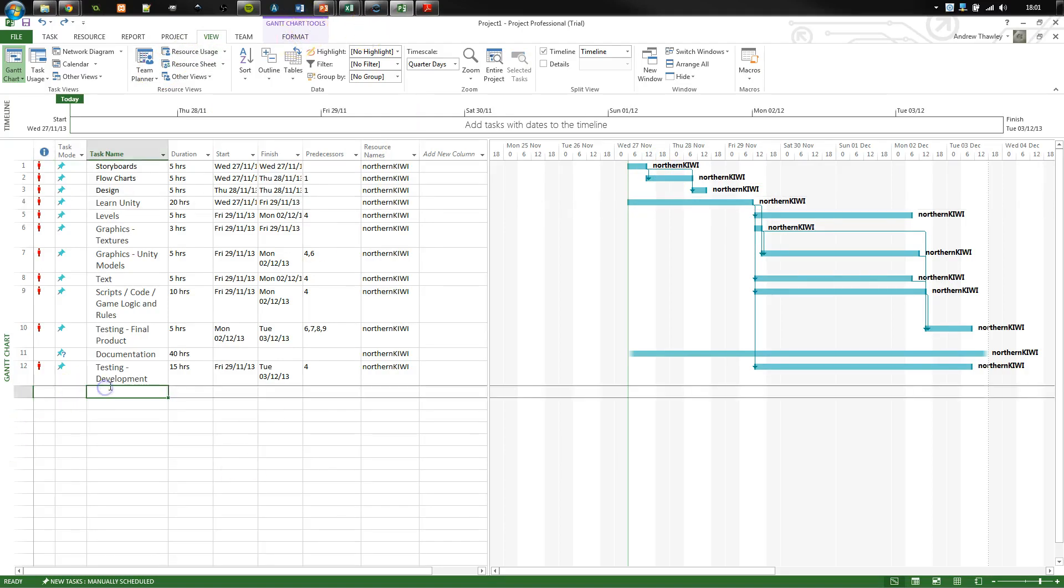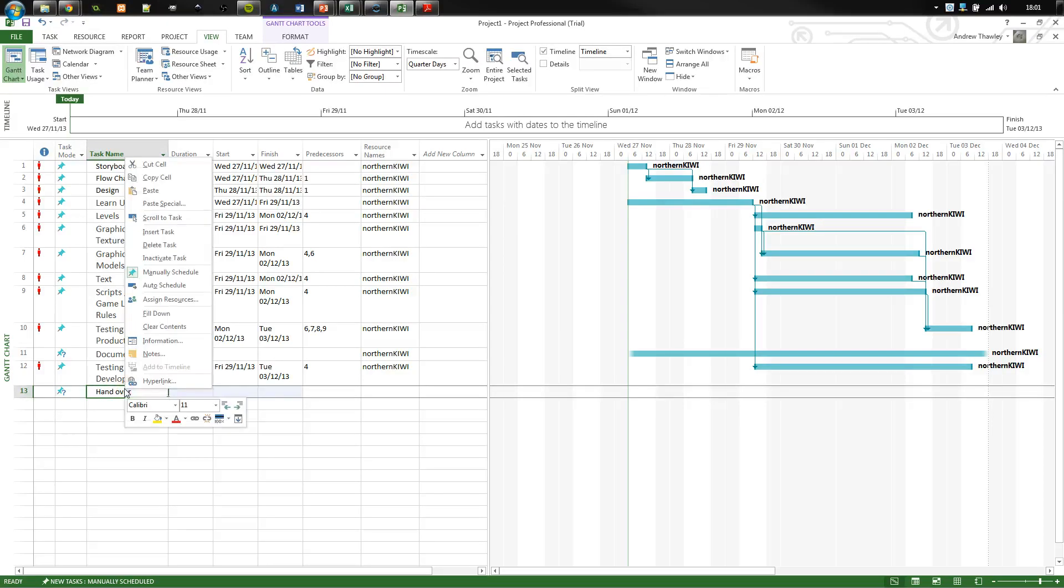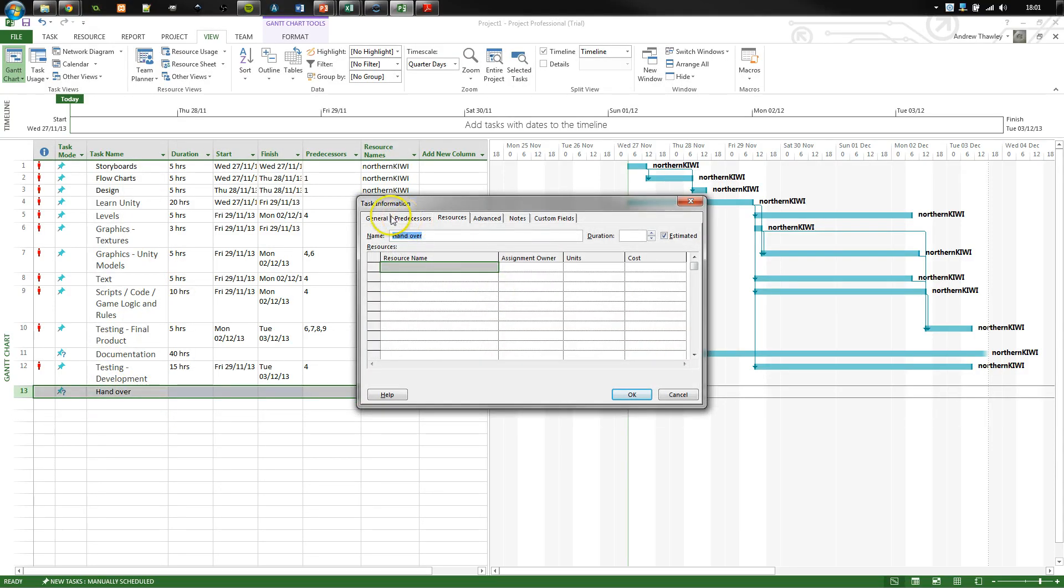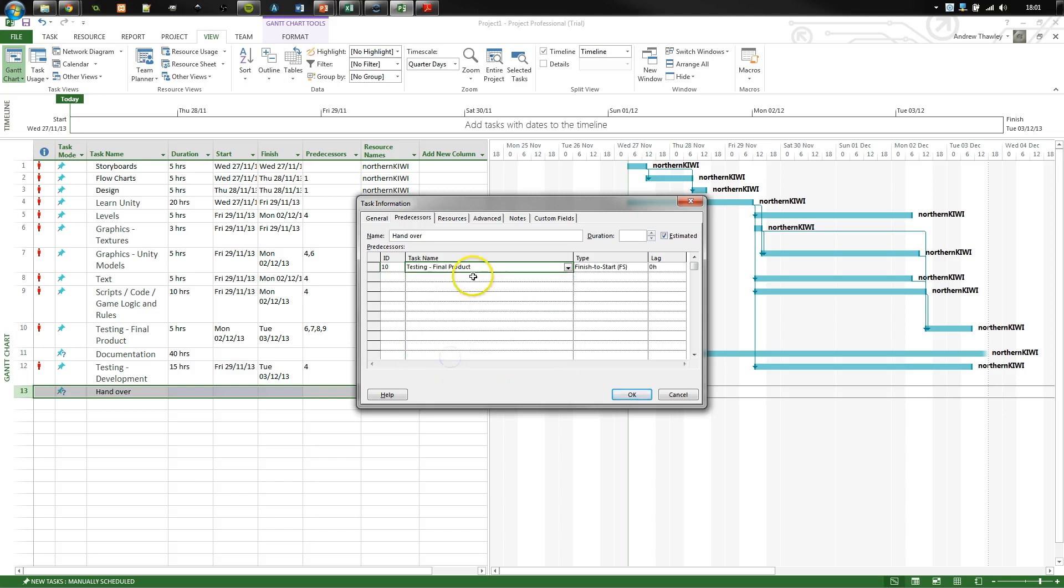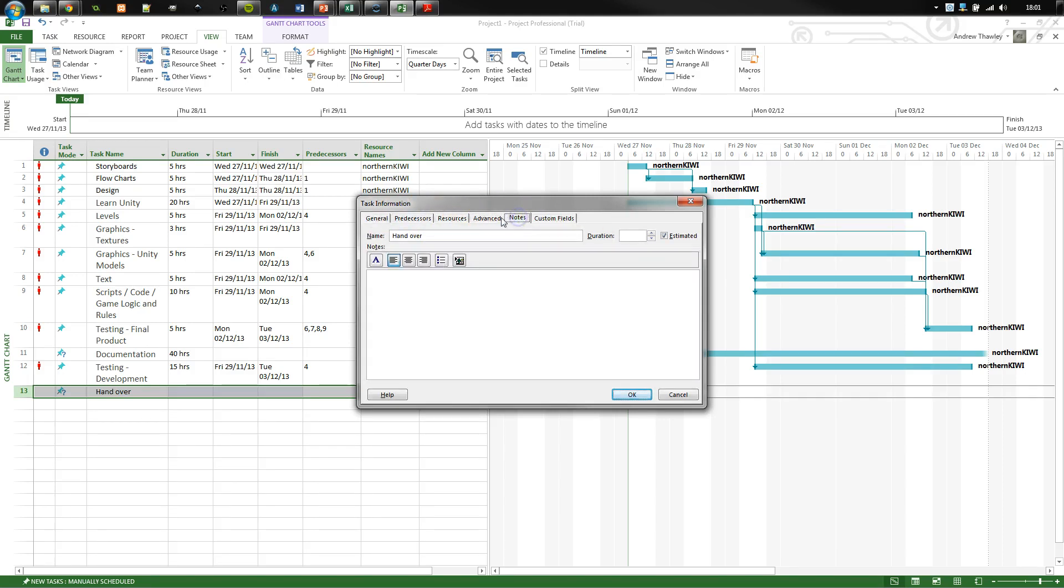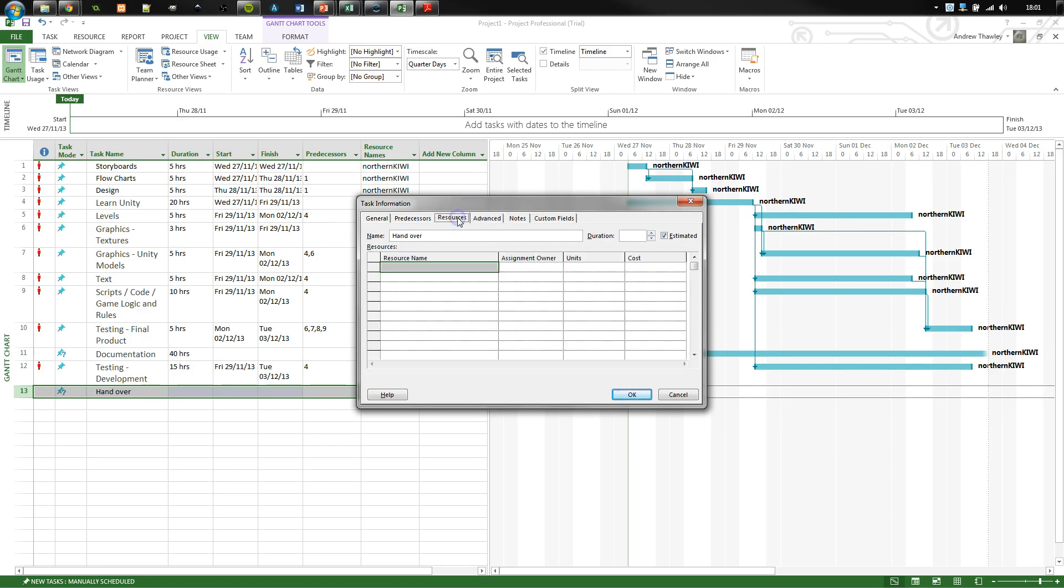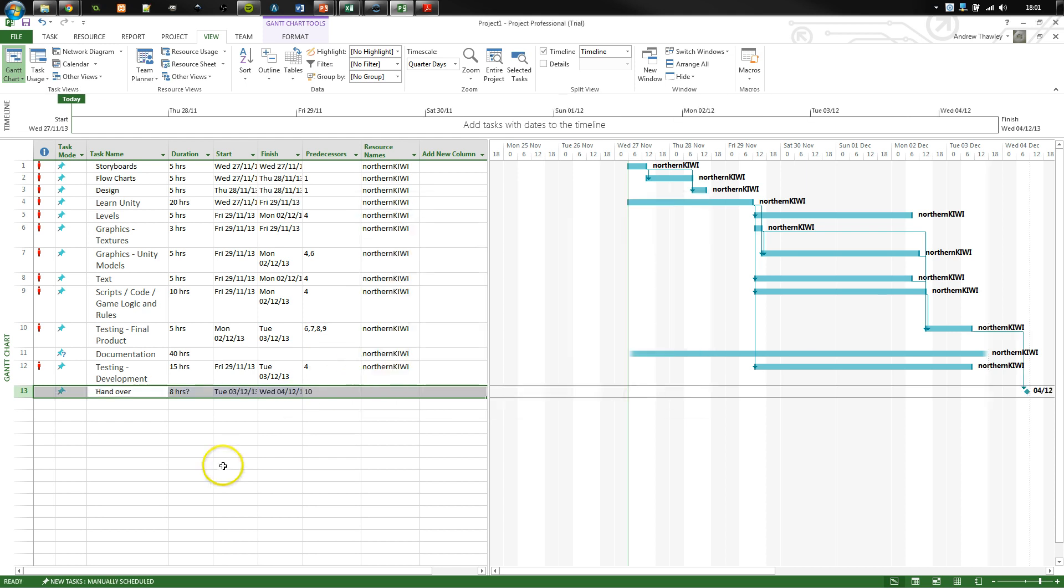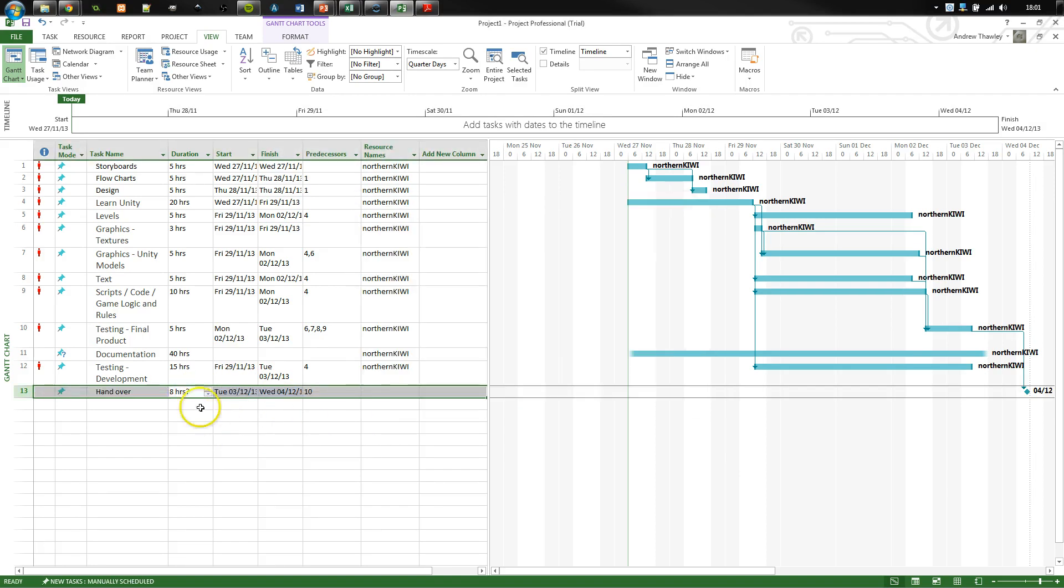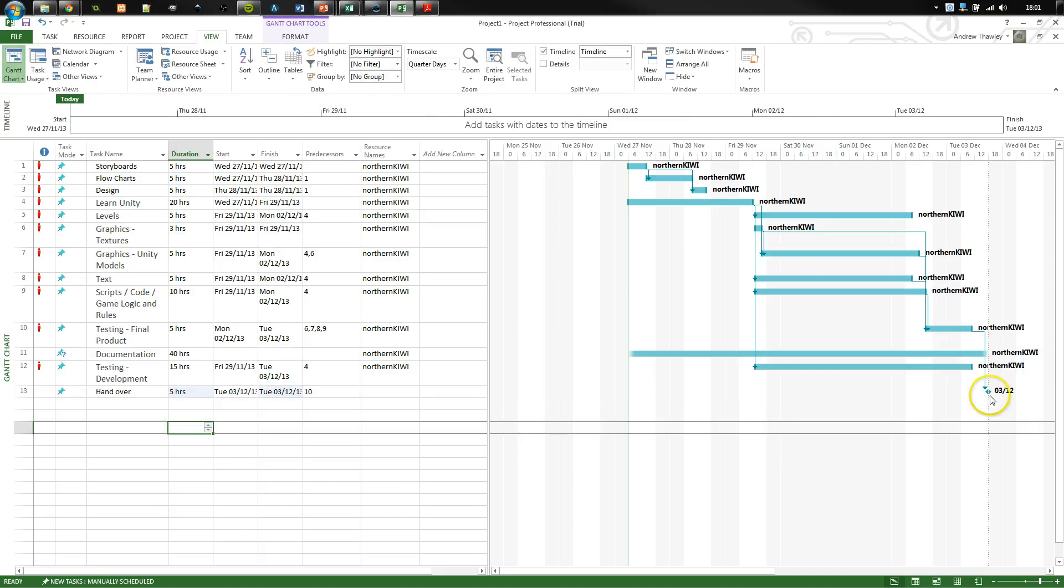And other things we can do, we might need a deadline, such as the handover. And what we're going to do, go and edit this. So we're going to do this. Predecessors will be, let's say the final bit of testing. And one of these is a milestone date. Mark task as milestone. So that basically means it has to be done. And let's just set that as a five hour. That has to be done on that date. So it can be no later.